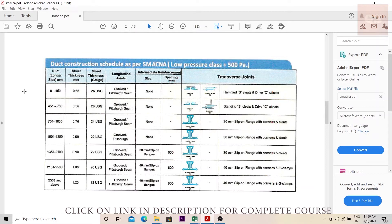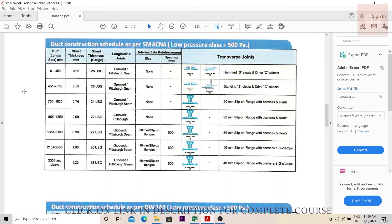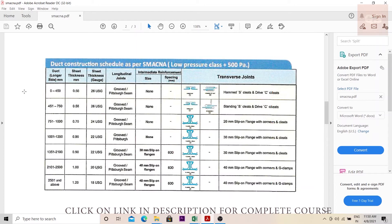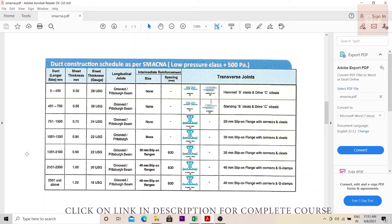For example, if the duct is 450 × 200 mm, the first number always specifies the width and the second specifies the height. So 450 mm is the width and 200 mm is the height. The longer side is 450 mm. According to the SMACNA table: 0–450 mm is gauge 26, 451–750 mm is gauge 26, 751–1000 mm is gauge 24, 1001–1500 mm is gauge 22, 1501–2500 mm is gauge 20, and 2500 mm and above is gauge 18.